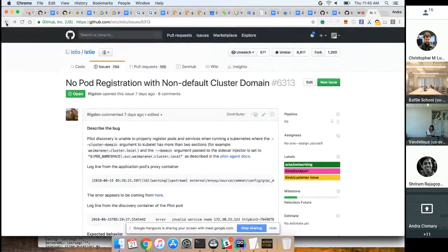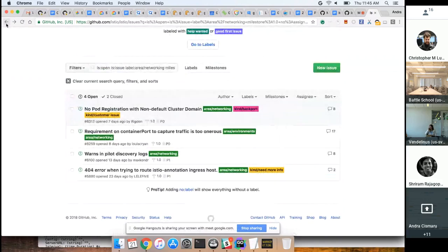And yeah, I actually wanted to say that for 1.0, we don't have to have all or the majority of the features in beta, right? But we need to have the core features in beta, right? We may have many smaller features that can be just alpha. Yeah.